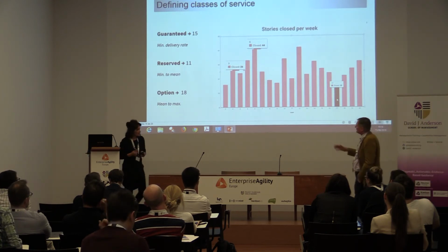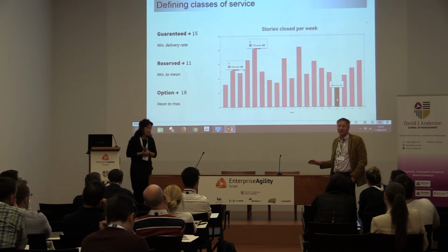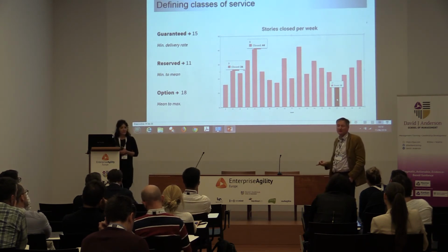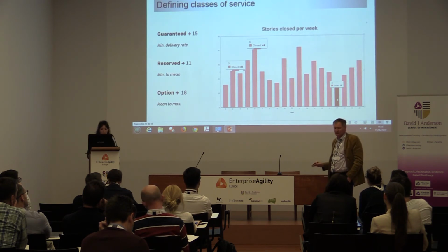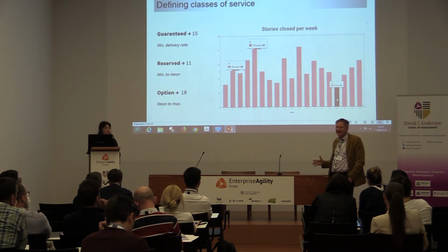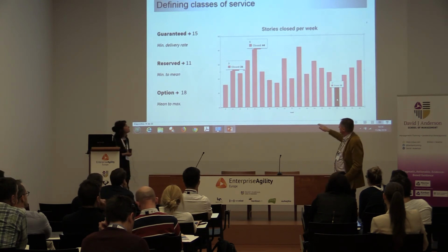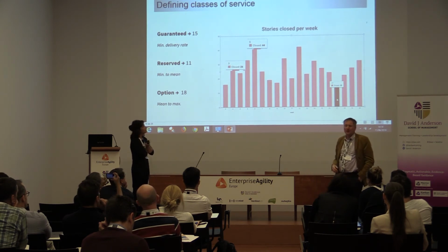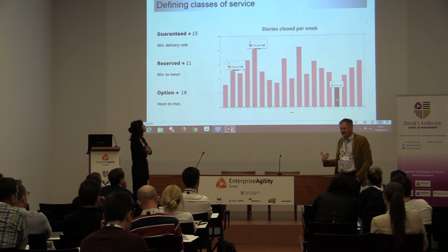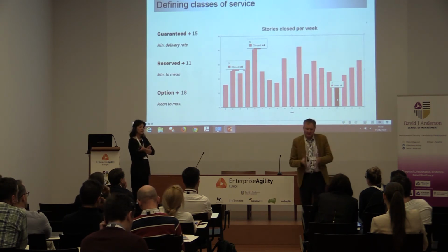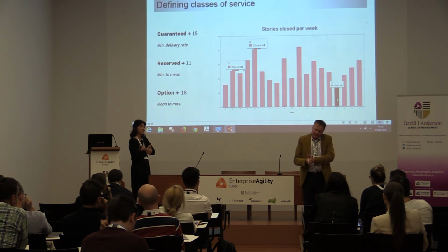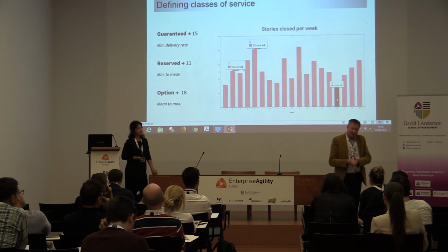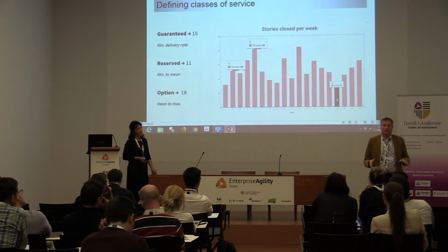More or less? So this team on average does 26 tickets per week. And on a bad week, the worst their performance has been is 15. So they're pretty confident they can always do 15. They'll probably do 26 more or less. And on a really good week, they manage to do 44. So they can afford to take 15 guaranteed slots, and then the next set from 15 to 26 are fairly likely to happen, but from 26 to 44, that's very marginal.